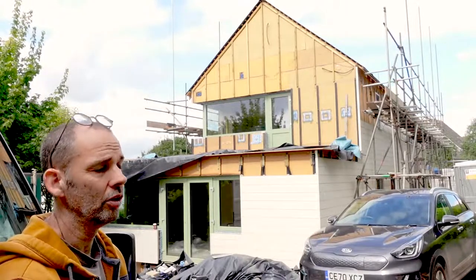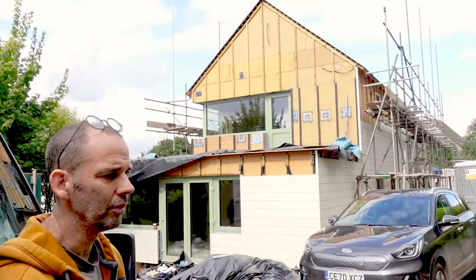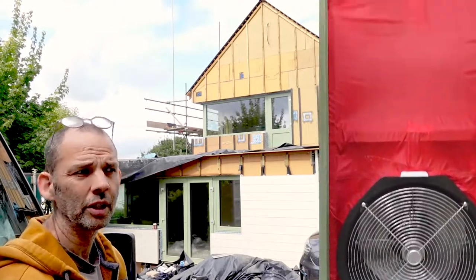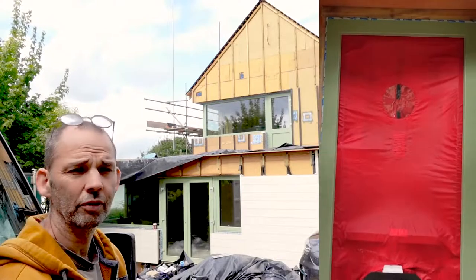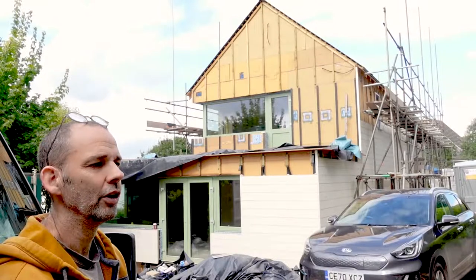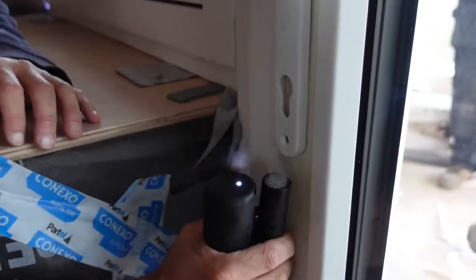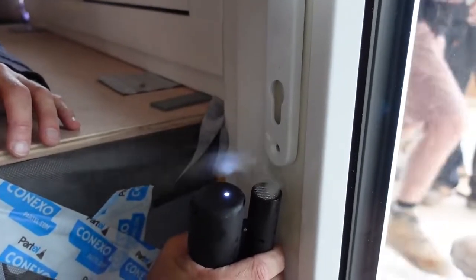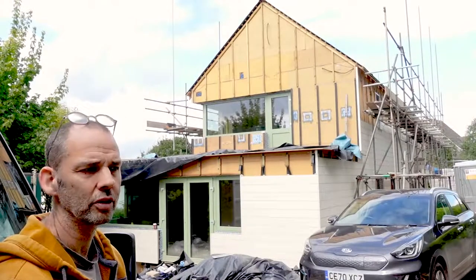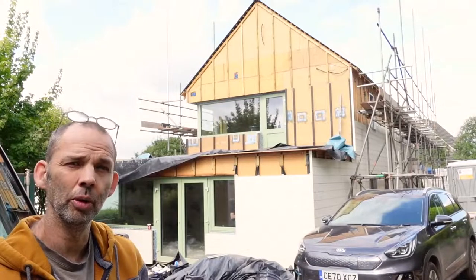And there's still a fair bit of work to do in here. There were some things that needed sealing up, the usual penetrations and so forth. So on our first test, we got to around 3 and found a few things that still needed sealing, some soil vents and stuff that got missed. So at the moment, we're down to 2.4. And we're just going through some of the other non-intentional penetrations that have been discovered on that first test and see where we get up to at that point.